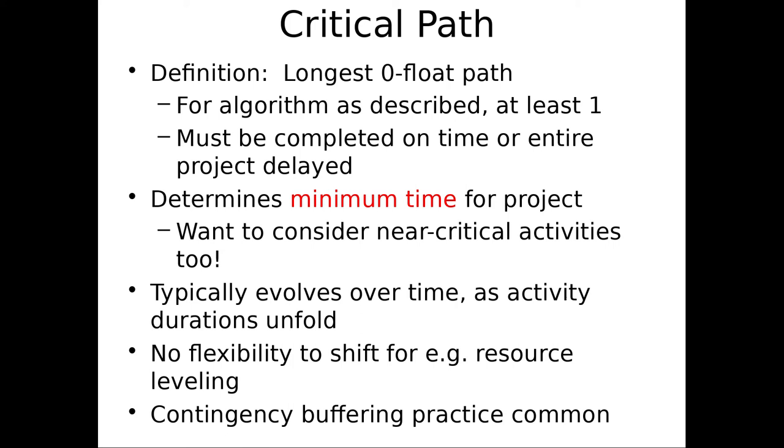Maybe it's mastering a new technology. Maybe it's getting some specifications written so you can start coding. Maybe that's on the critical path, okay? So the critical path points out to you which tasks are the most important to stay on top of. If you let up on the critical path, you're going to be delaying the whole project. By definition of late start, late finish, if you make the start later than the late start, you're going to delay the project. If you delay the start beyond late start, you're going to delay it. Okay?